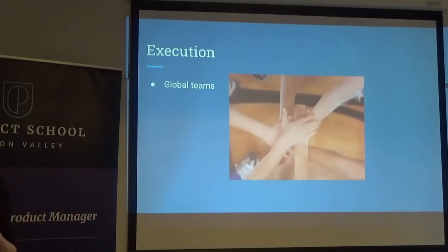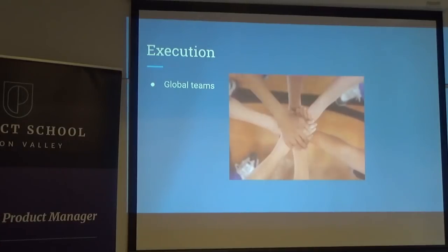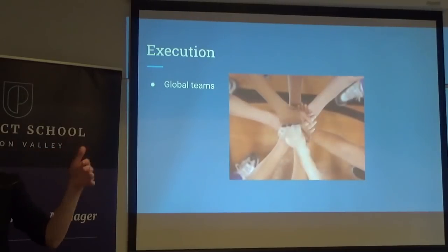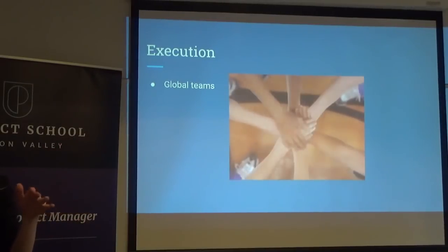It's also a thing of you have limited resources at the top. How do you make sure that you pick the right ones, and the ones with the most growth? I think there are a lot of frameworks out there. One that comes to mind is the RICE framework, which is reach, impact, confidence, and effort.